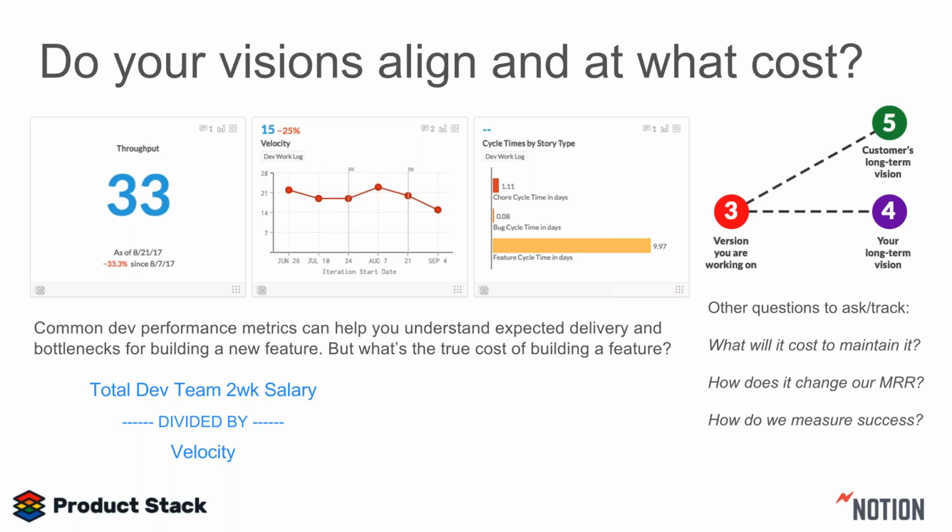And that's not a metric that should be used as a whip where you're trying to get it as low as possible. It should really be about pure transparency and decision making around it's going to cost us X amount just to physically build this thing. Is that worth our time, right? Like if it's going to cost $10,000 to build, but we can only expect $3,000 in revenue from it, that should help you decide whether or not that's a great thing to build. So these are a couple metrics you can use to help align those visions.